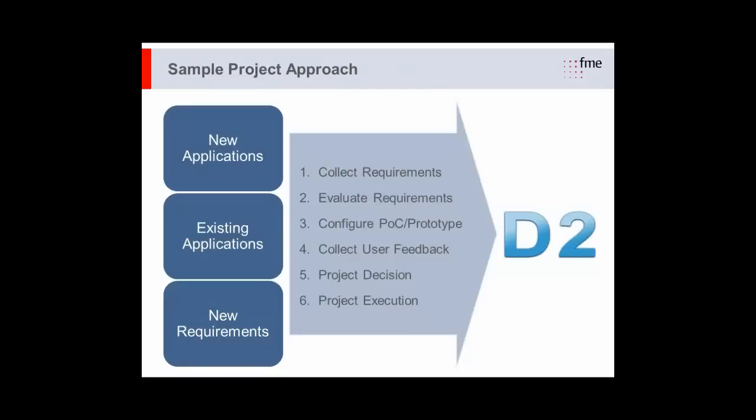And with its configuration model, D2 also allows for some relatively easy communication with the business in workshops, for example. The prototype can be looked at together, and small things can even be changed on the fly in a workshop together to show the impact of the changes. So this approach supports the decision-making process in the further project and helps you to decide on the final requirements on what to implement with D2 and what to maybe leave for a later project stage.